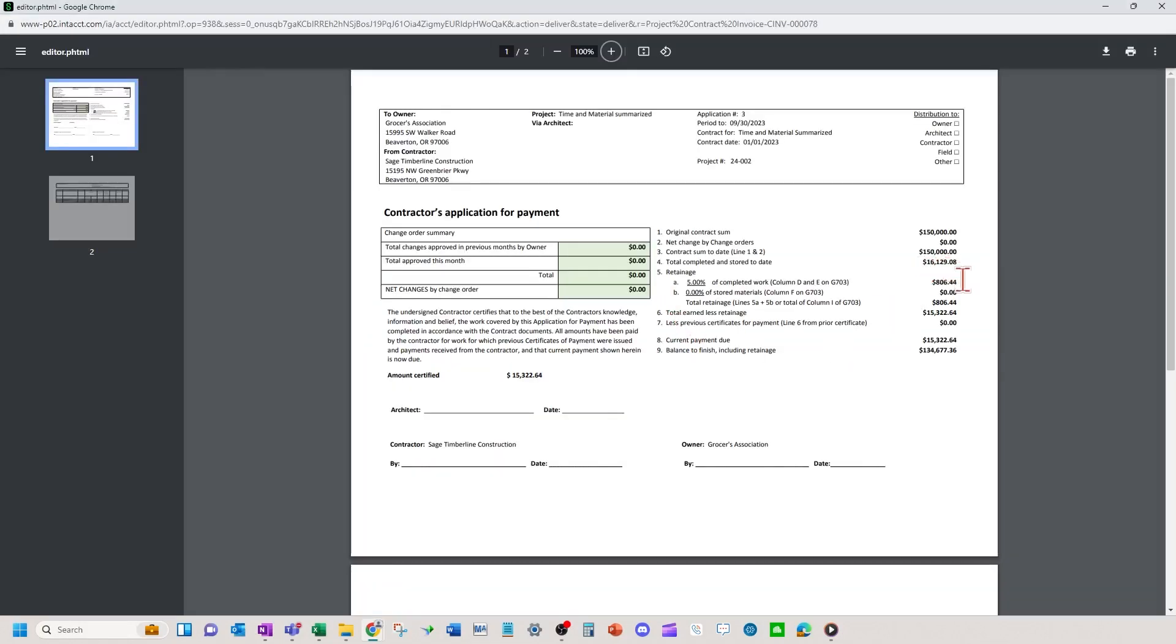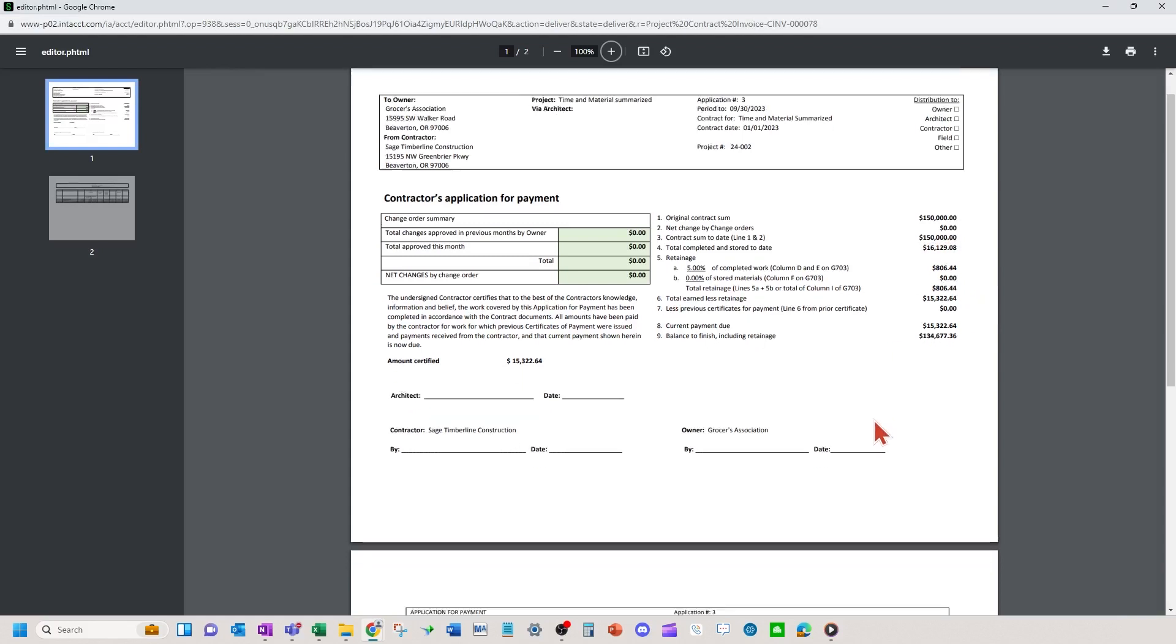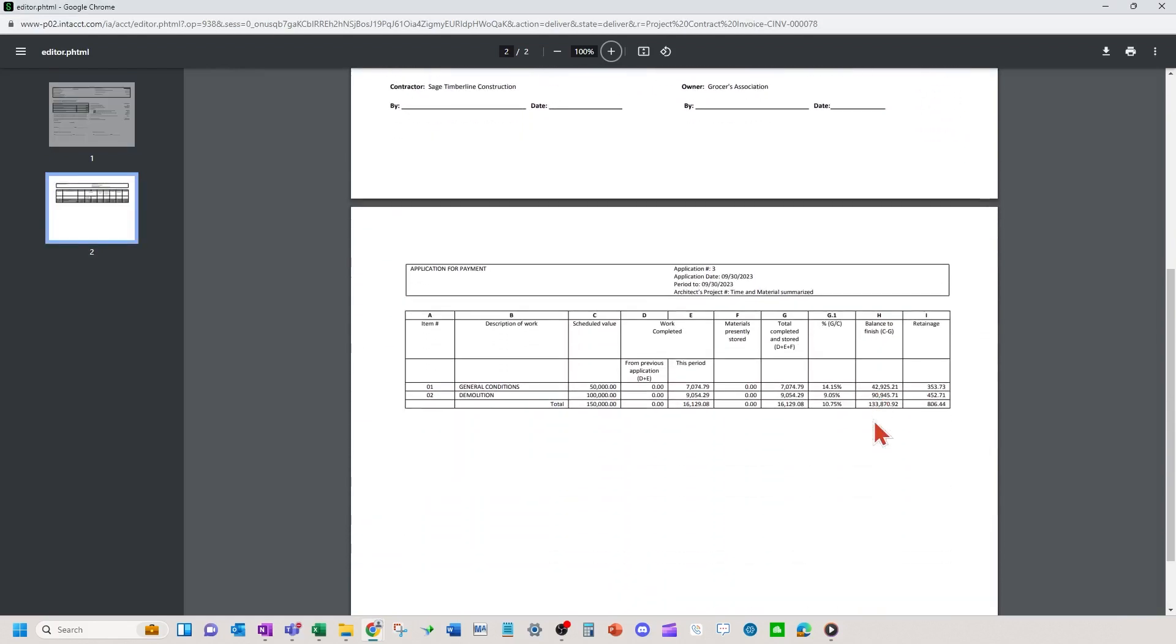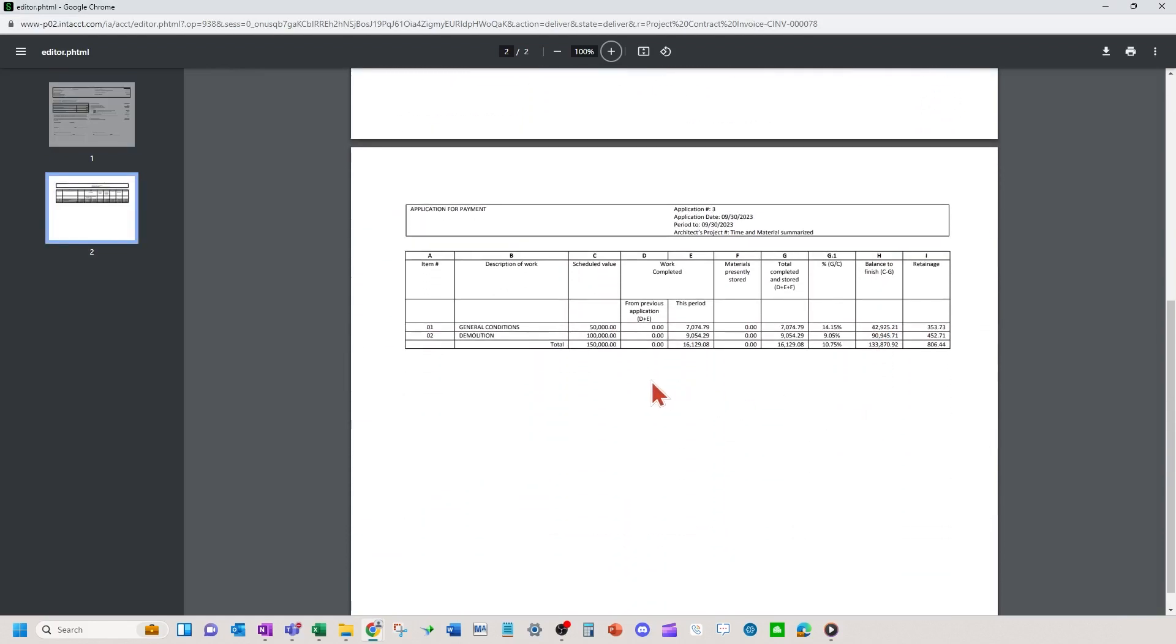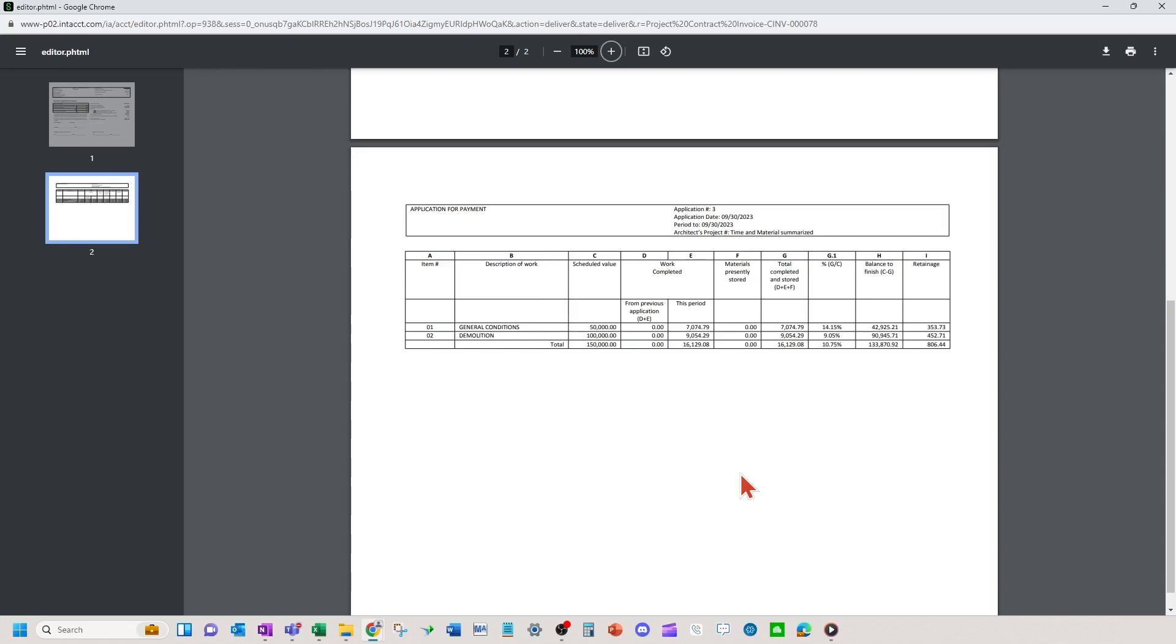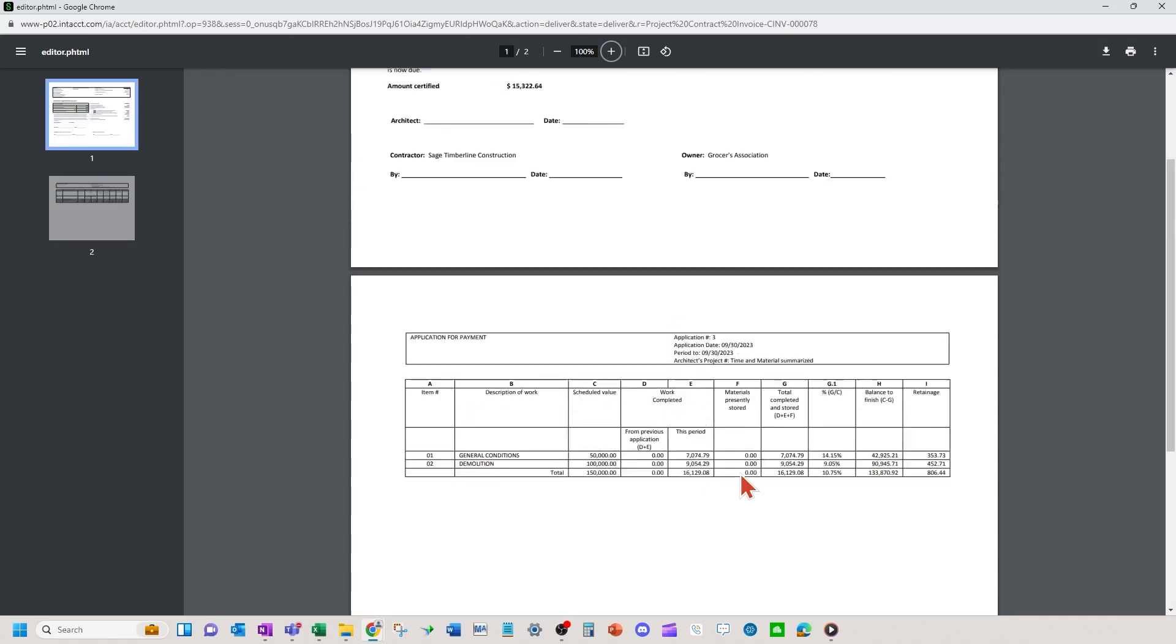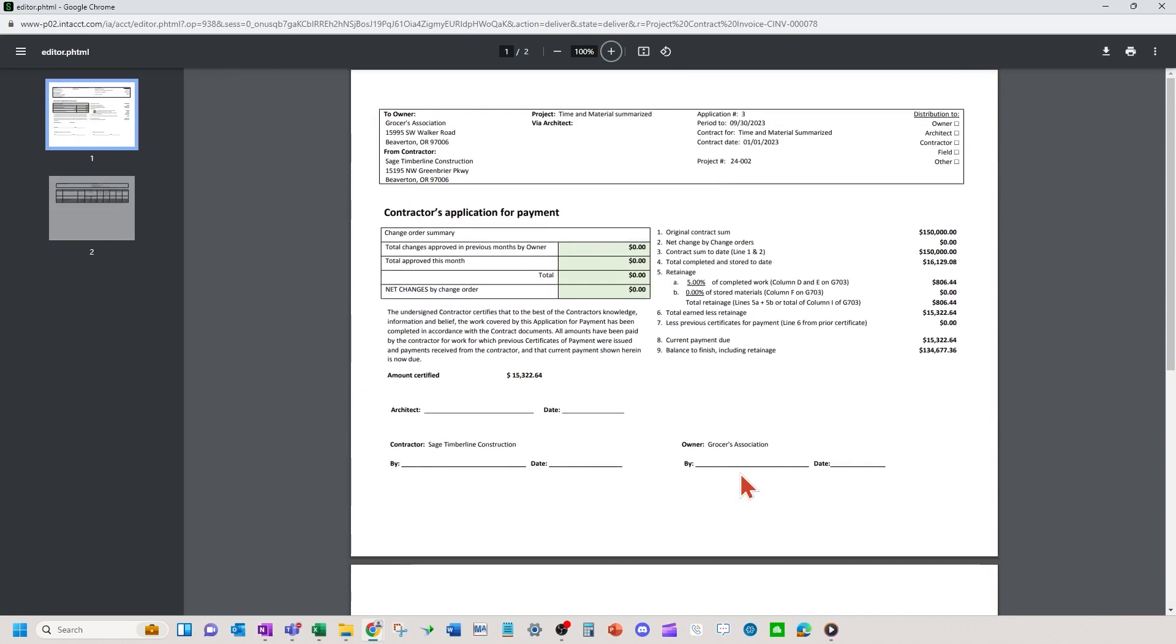So you can see the 16,000, the retainage held, and then you can see our detailed lines and it summarized those four accounts payable bills into each line as it showed on the previous screen. So this is the final output if you set up the time and material to summarize appropriately.